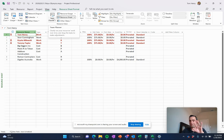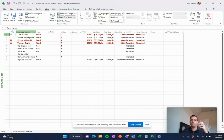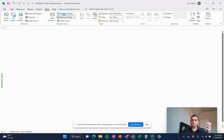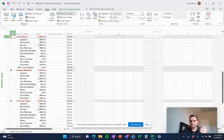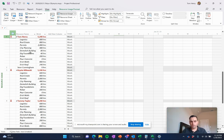If you want to cross those views over and see what tasks have what resources, or what resources are working on which tasks within my project, I can do that as well. You see here, Tom Henry is working on all of these different tasks.